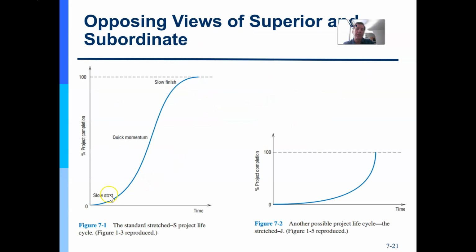In the end, a typical project budget will look like this S curve on the left, where you just don't start out the gate running with your full project team, right? You build your team, you collect them over time. It takes time to stand up and get going, to turn on the lights and get things moving. And that's why it shallows at the very beginning.